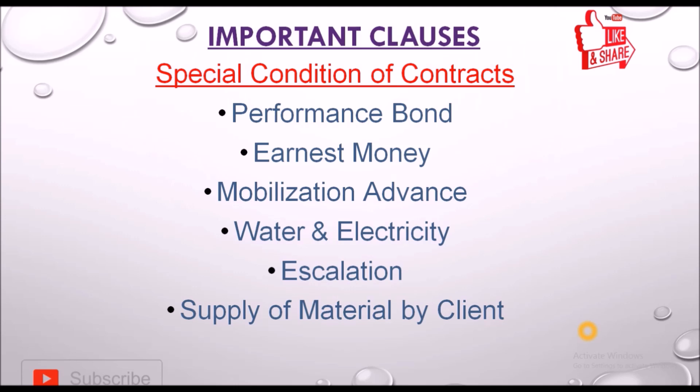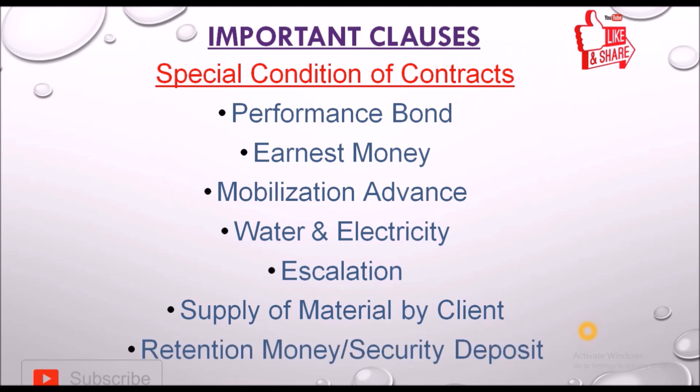Last but not least is retention money and security deposit. As explained earlier, during the defect liability period, the retention amount is withheld with the client for rectification of the work. If the contractor does not rectify the work during the defect liability period, this security amount is used for that purpose.